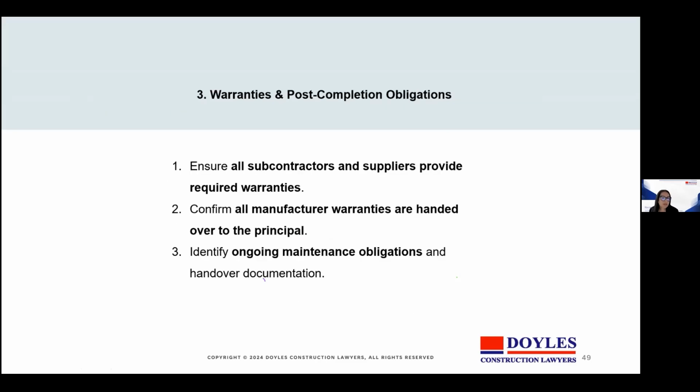Warranties and post-completion obligations. Ensure that all subcontractors and suppliers provide the required warranties. Confirm all manufacturer warranties are handed over to the principal, and identify ongoing maintenance obligations and handover documentation.